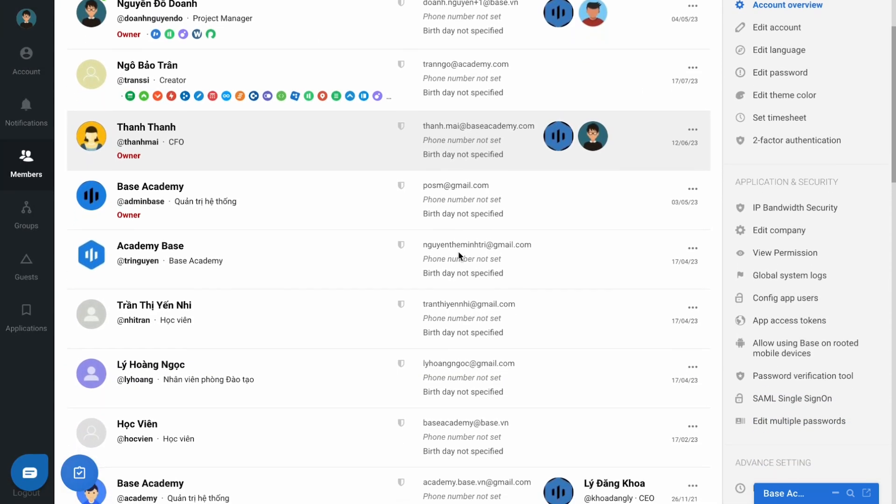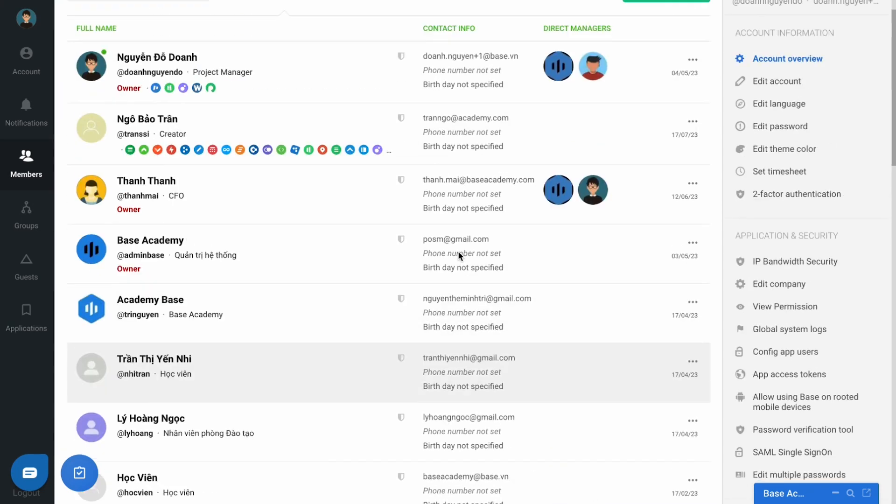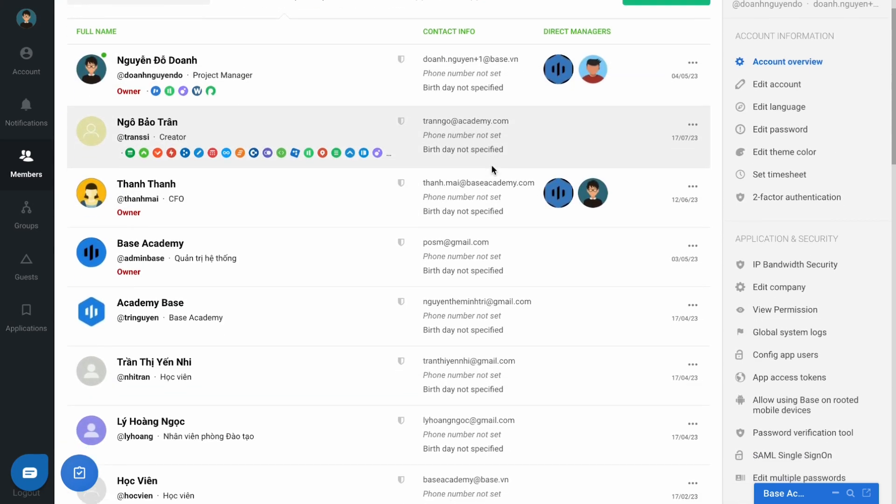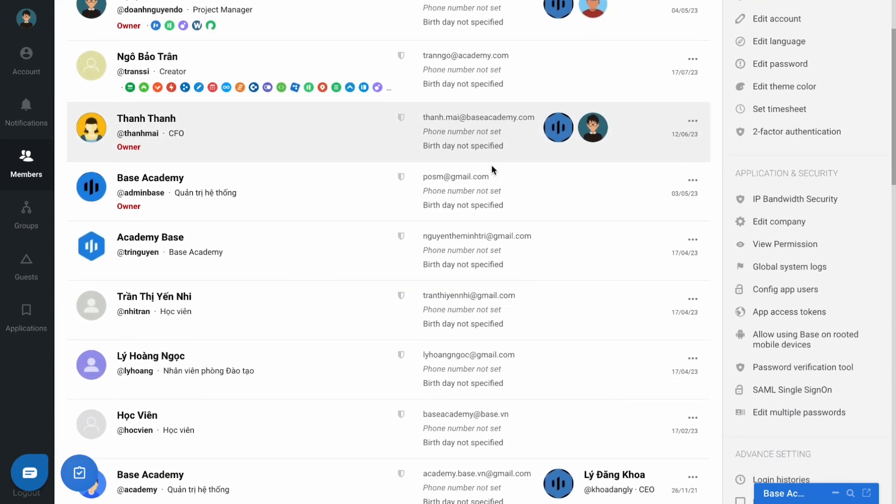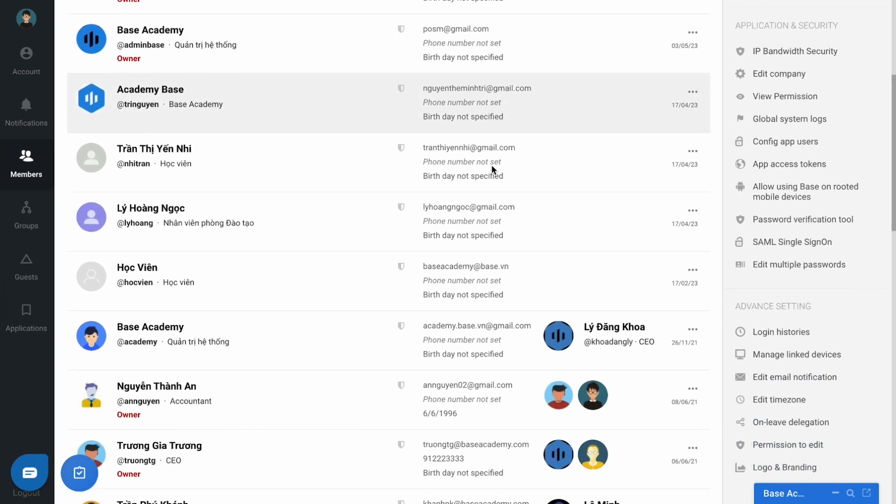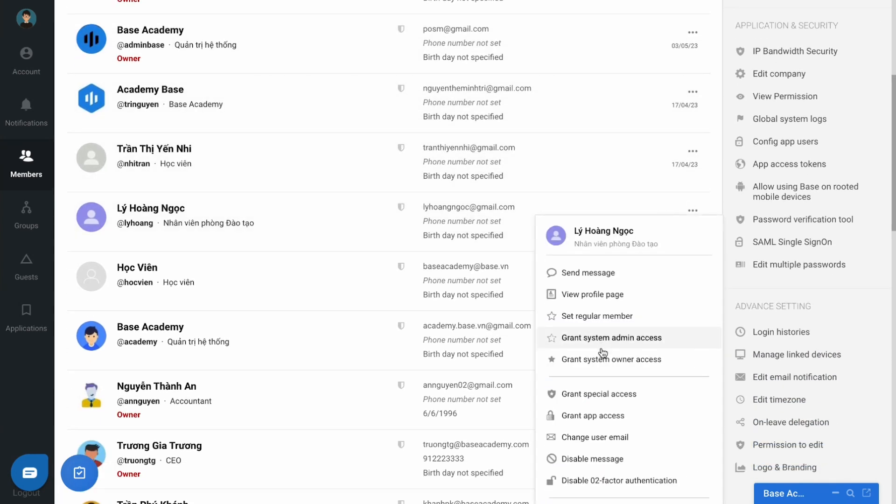However, the function Direct Reports is only affected when the business has established the Direct Manager for each account in the Base Account application.